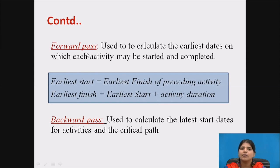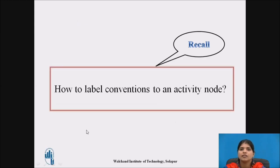With the help of the forward pass you calculate the earliest dates. Then the backward pass is used to calculate the latest dates — that is, the latest start date and the latest end date for the activities.